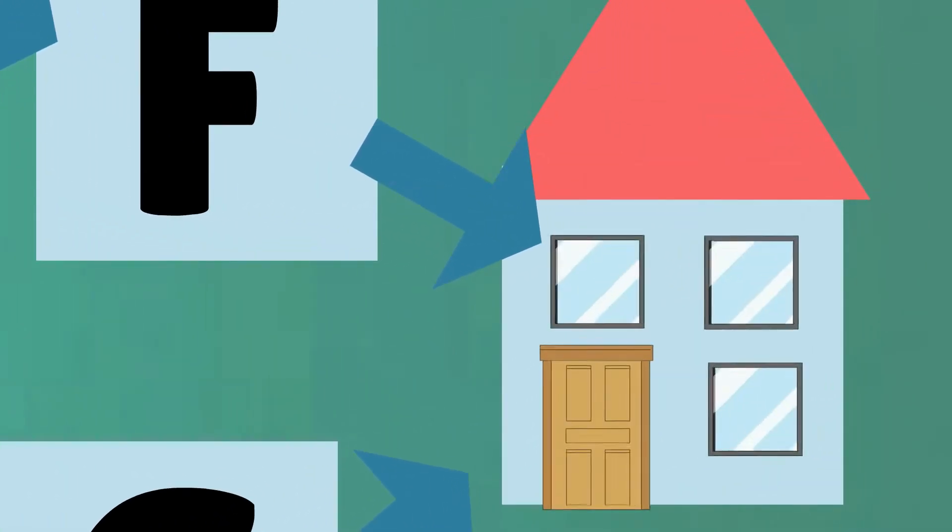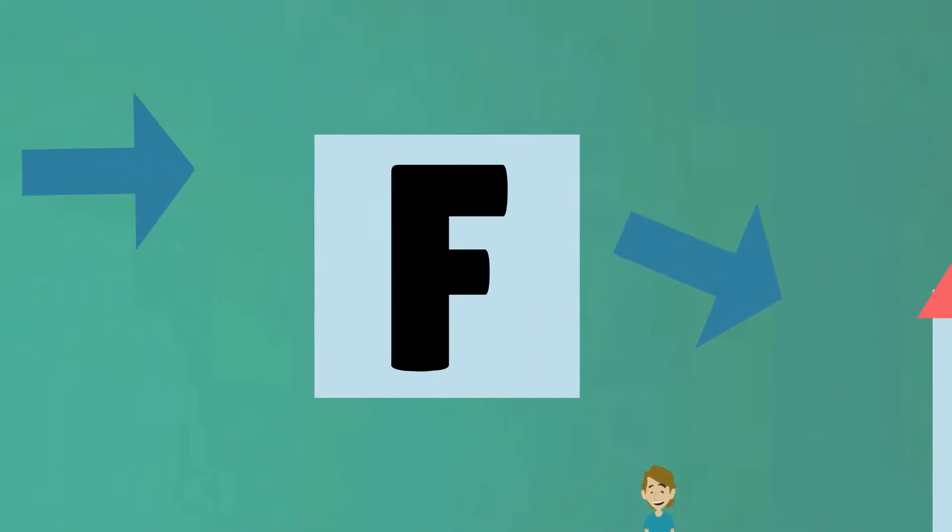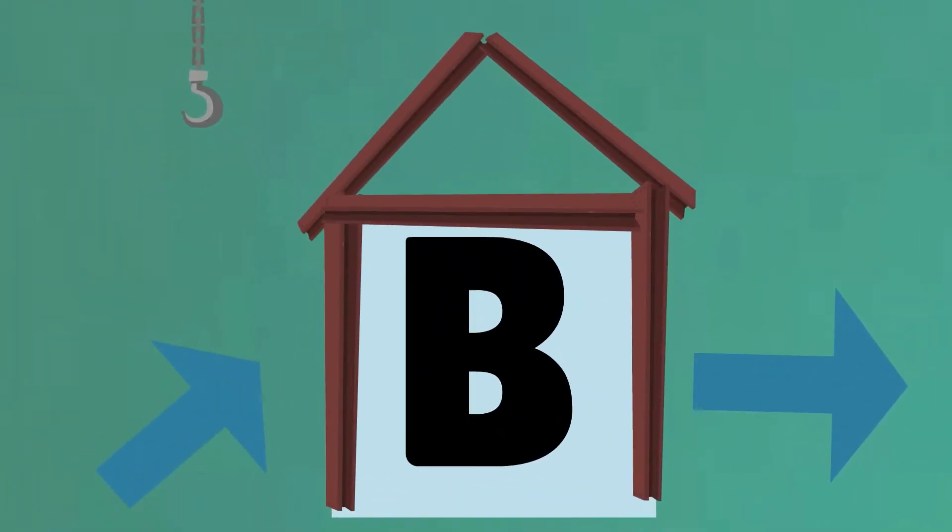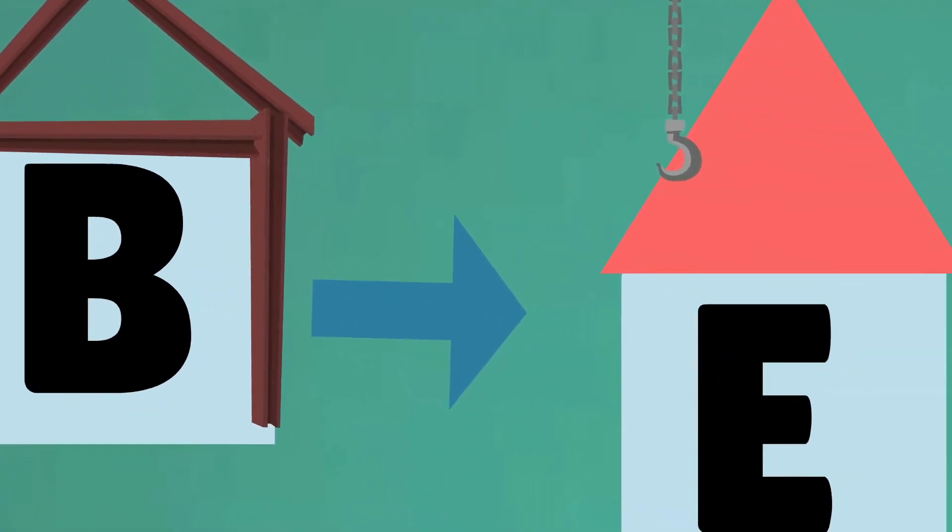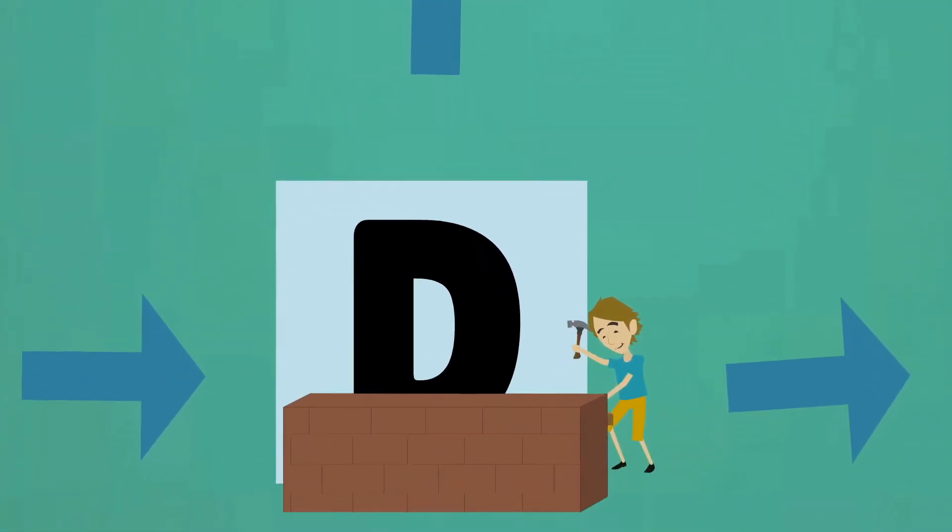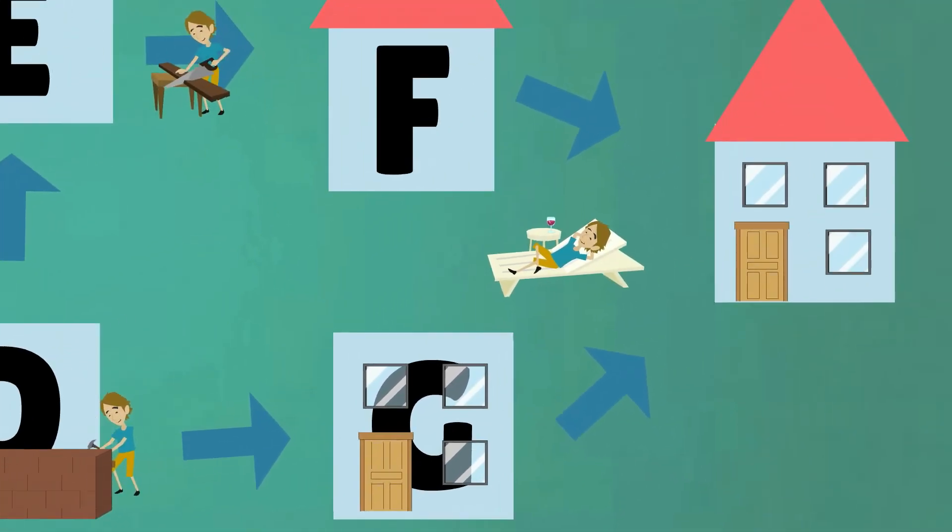Let's say that we are building a house. In this case, activity B, the framework, needs to be finished before the roof can be placed. But meanwhile, the walls also need to be built before the roof can be placed. When, eventually, both F and G are finished, activity H can start.